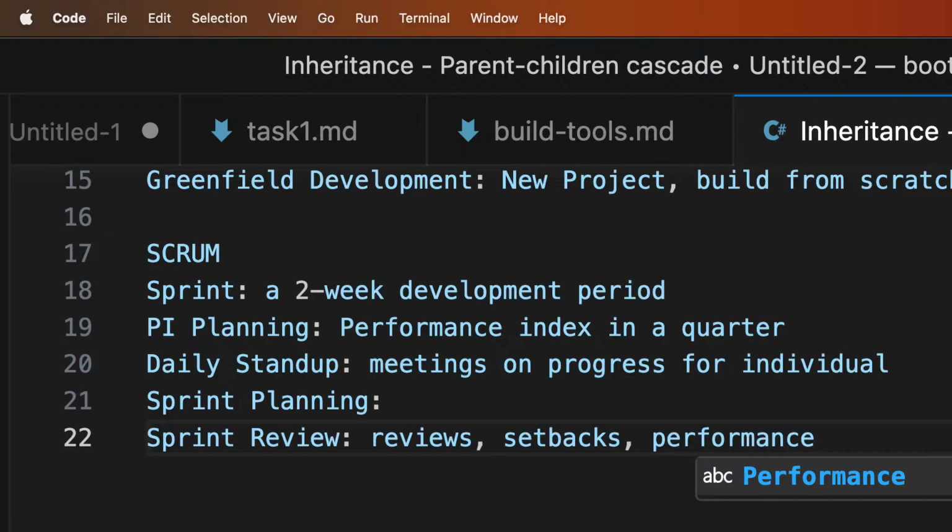You look at what you did that made you achieve your goal or do something better, or what are the things that slowed you down. Maybe there are too many complaints or too many bugs, or it takes too much time to review, or too much time is spent in meetings arguing when nothing has been done. That is what you do during sprint review, and then you can unanimously decide what needs to be removed and what not to be done again. If you are spending 30 minutes, maybe that should be cut down to 15 minutes. So you agree on that.